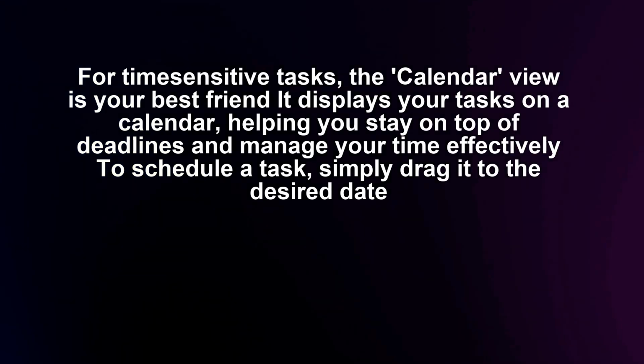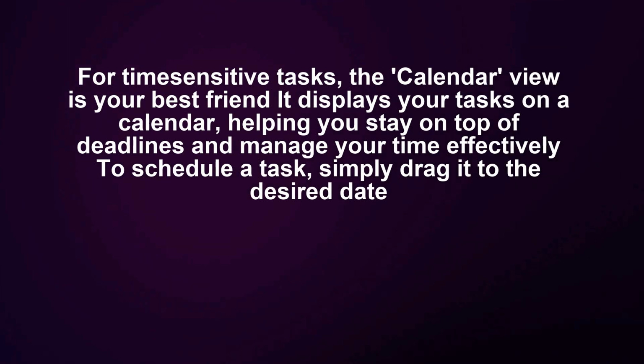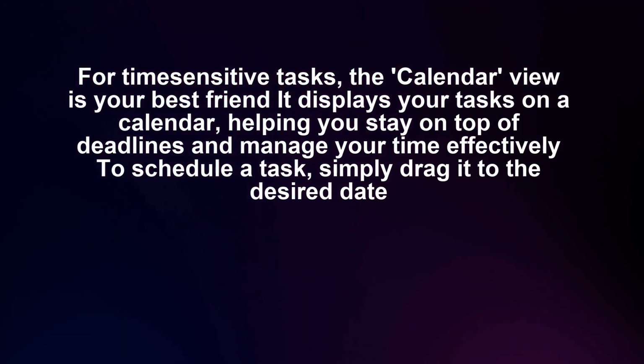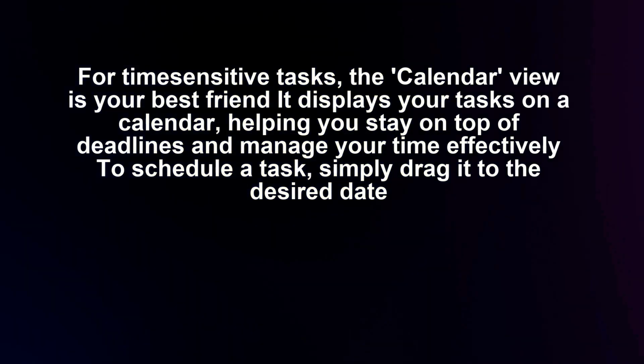For time-sensitive tasks, the calendar view is your best friend. It displays your tasks on a calendar, helping you stay on top of deadlines and manage your time effectively. To schedule a task, simply drag it to the desired date.